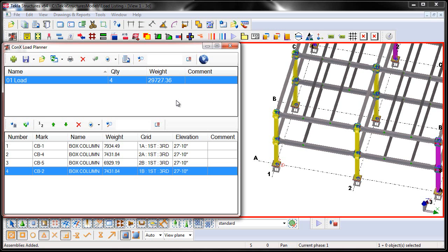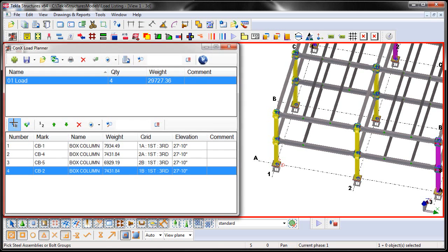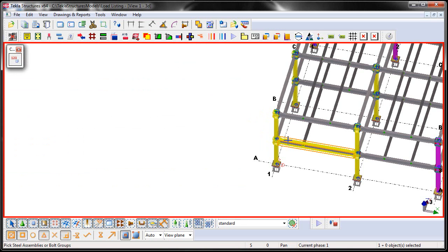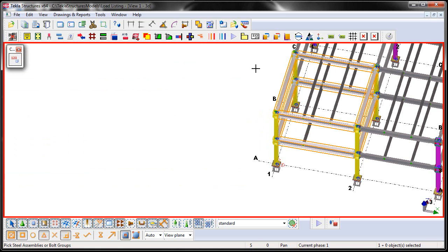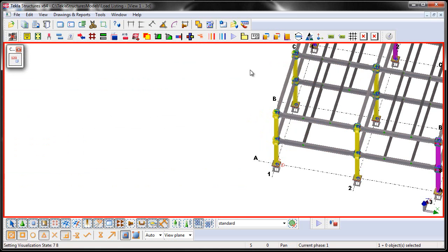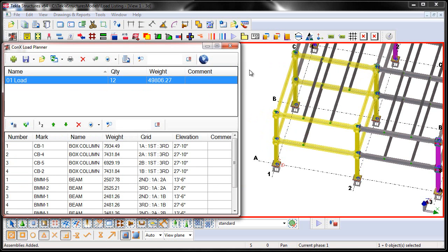We can just continue to add additional assemblies as required. So let's just go ahead and say Add. And then we'll pick in the vertical order, which is typically how ConnectStack will erect the structure. And middle mouse button when complete. And the yellow colorization basically shows which assemblies have already been planned or loaded.